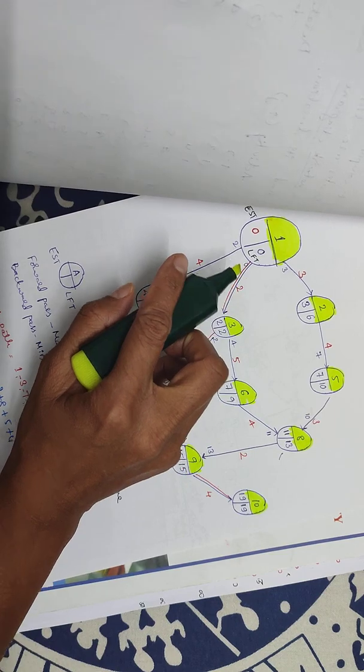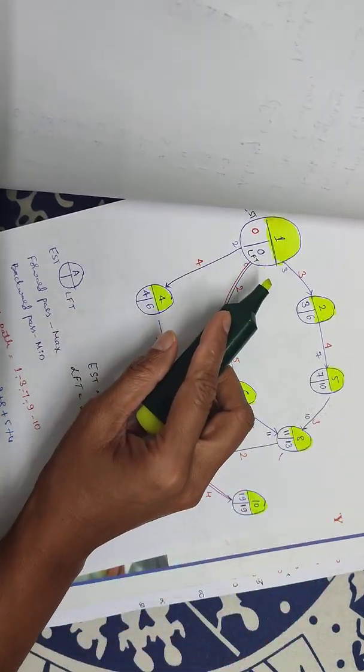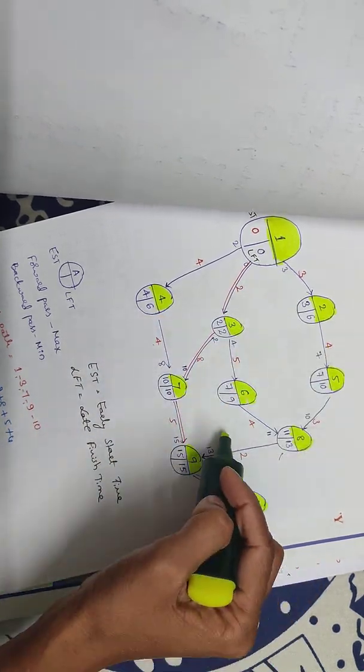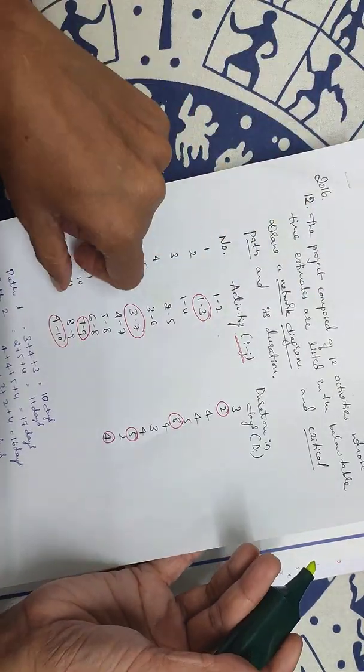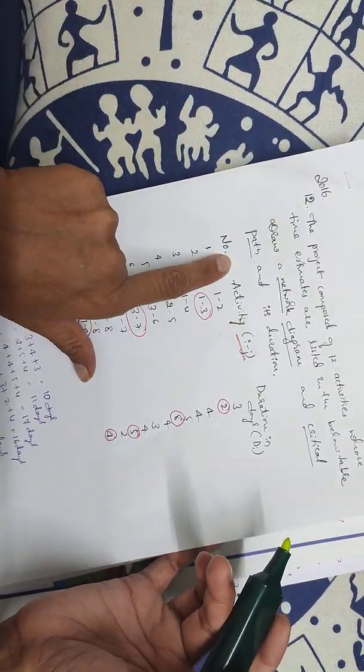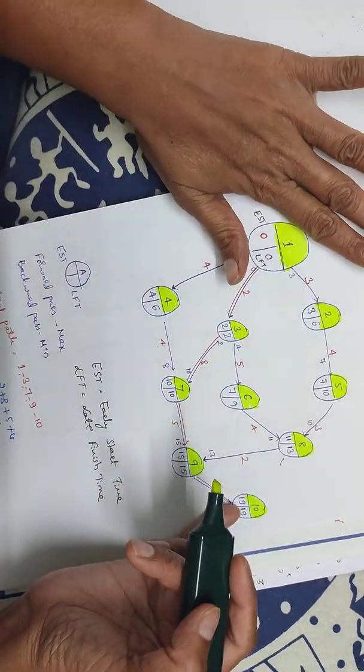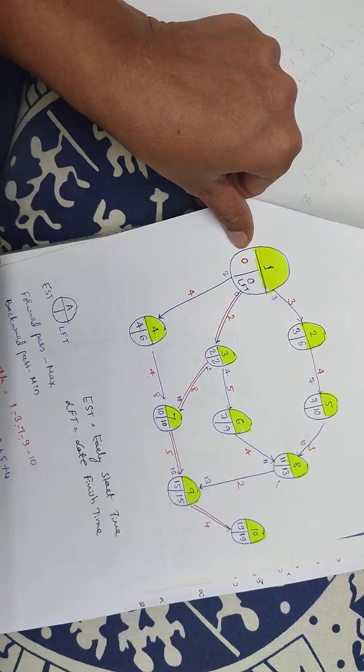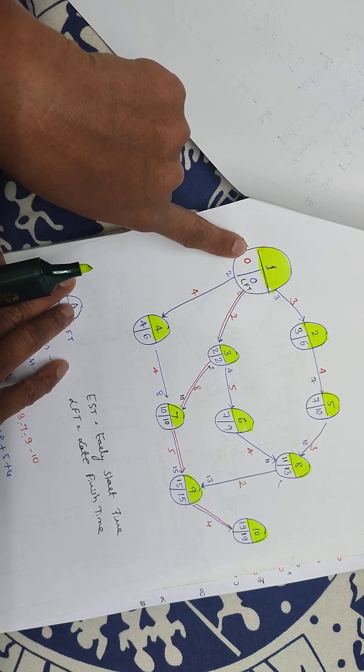This is the network diagram. We'll start with this activity. Next we'll find the critical path and duration. We'll start with the forward pass. First early start time is 0.